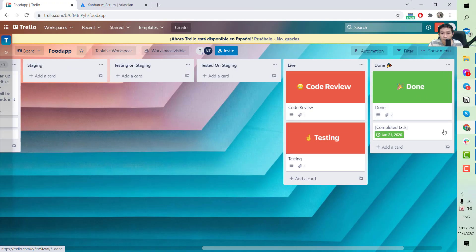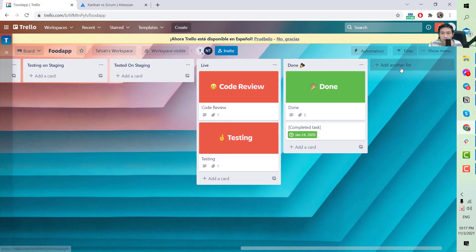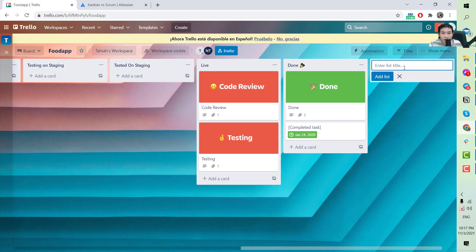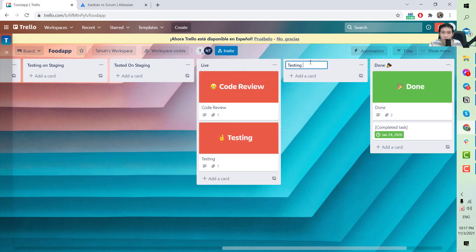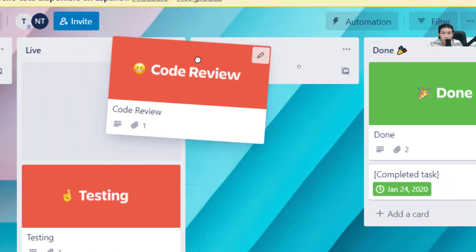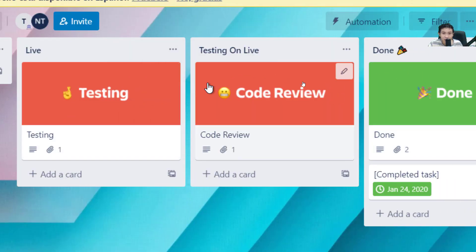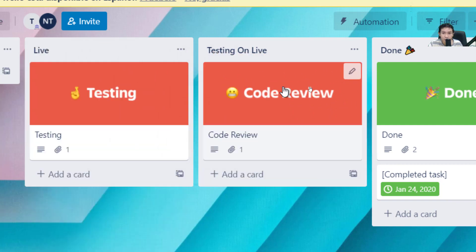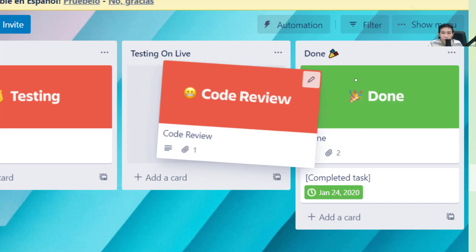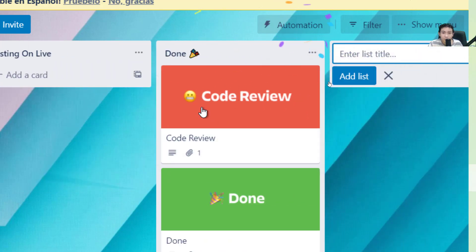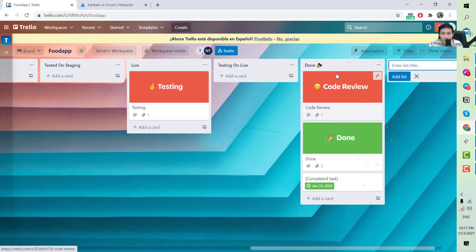If the customer also requires testing on the live environment, you will need a 'Testing on Live' column, where the QC places tickets they need to test on live. If testing is successful, they move the card to Done — the final column that lets everyone know this card has been fully tested.